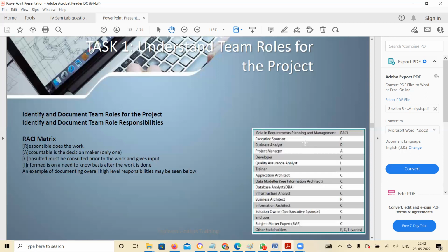That's why they need to know the status, what is happening, when it is happening. Same thing with QA, because they need to test it, so they will keep track of the timing. Okay, it's done, now it is in the development phase. Now I have to create my own document and get ready for testing. So they are informed about what is happening. Is the project moving faster or slower? So that they will plan their work accordingly.